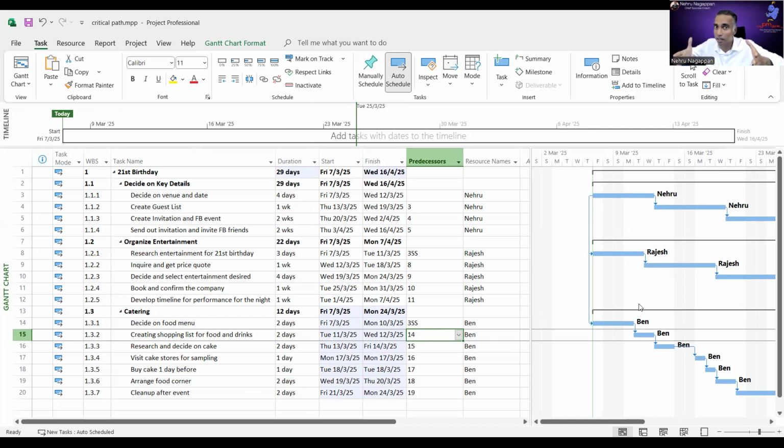These 3 guys will now decide the future of this project. They will decide among the 3 of them who is going to finish first and finish last in the project. Did you notice it was 63 days duration before? Now it's 29 because it's running in parallel. All right, you have shortened your overall project date, right?